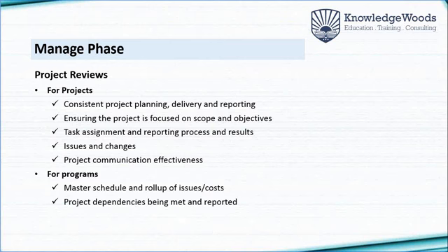When you review programs, focus could be on how effectively you manage the dependencies between the interrelated projects, how it is being reported, and how progress at the lowest level is rolled up to the master schedule, to the program level schedule. And not only this, you should also assess the skill set of the individuals to whom you have provided training, coaching, mentoring. Is any further training required?